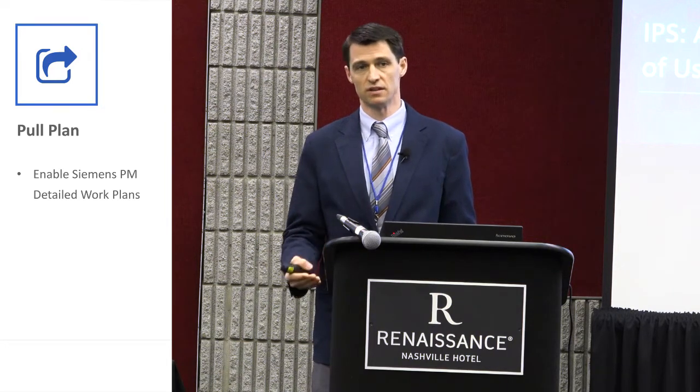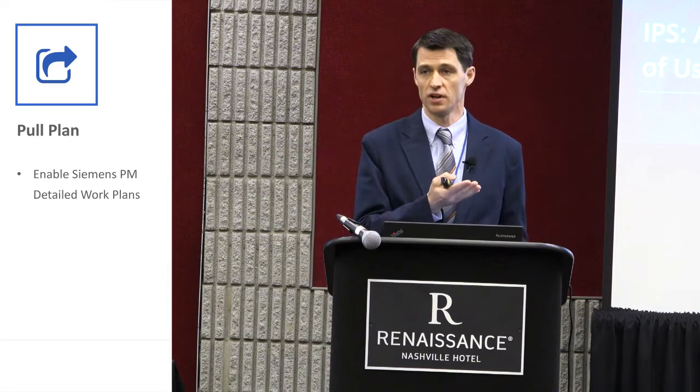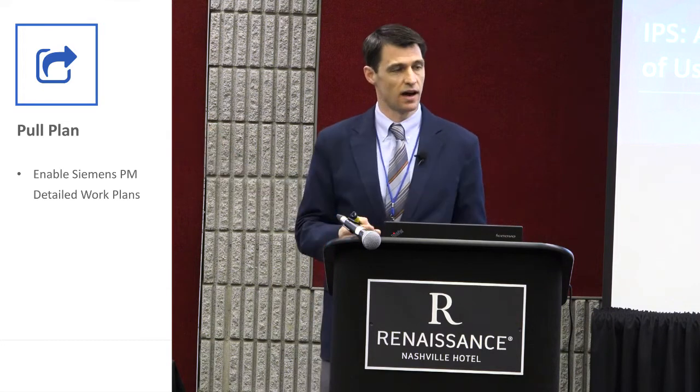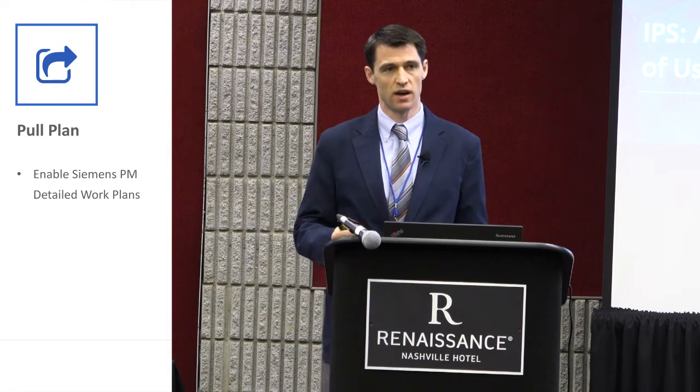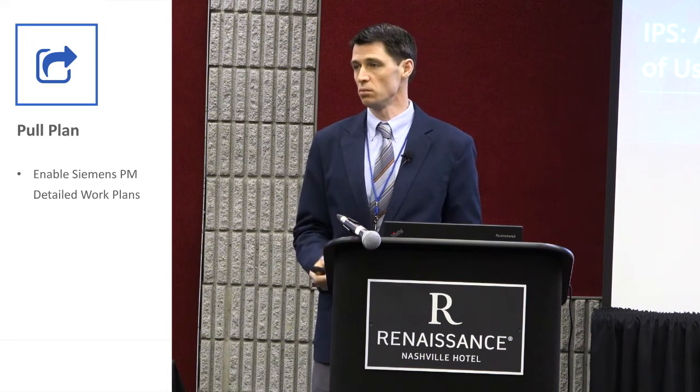They need to have people cleared. They need to have equipment ready. They need to have product capacity built up so we can take the facility down and there's not an impact to inventory. They're stretched thin, and they don't have that ability to get that information for themselves, so we help them develop it in a pull plan.